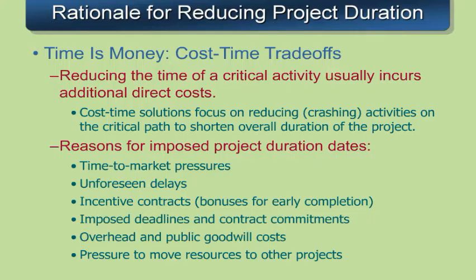And really what we're looking at here for reducing project duration is the trade-off between time and money. We're going to incur some additional costs by reducing the time of a critical activity when we throw more resources at it. We may wind up saving some indirect costs that we'll talk about in our analysis as well.